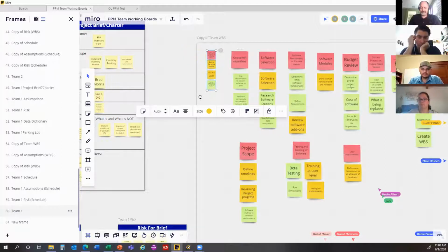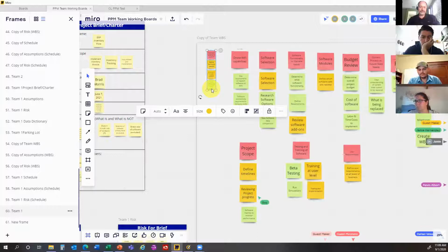What I'd like you to do is go across the top and number them 1.0, 2.0 all the way through, and then inside, number the headers 1.1, 1.2, 1.3, 2.1, 2.2, and so forth. Add the additional headers or columns that are missing, the planning piece for those that are missing, or anything else you can think of. The easiest way is to go through each heading, and under each header brainstorm to see if anything else is missing. So you practice what we just did, but you do it header by header versus doing the big picture. If something is missing, brainstorm for that header the components or tasks that are missing.